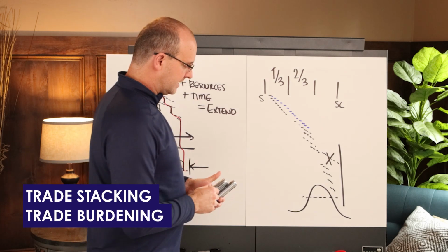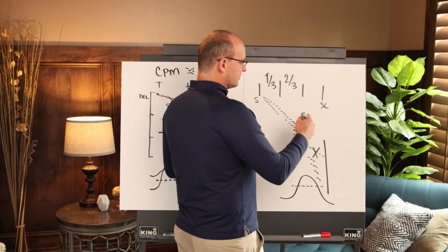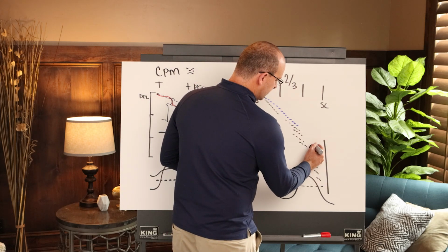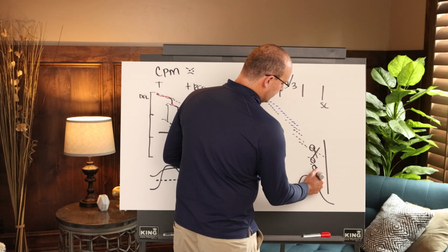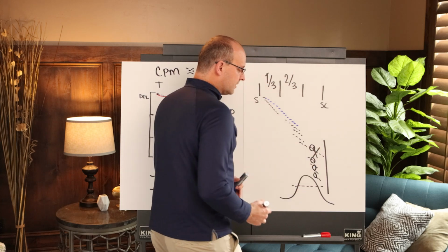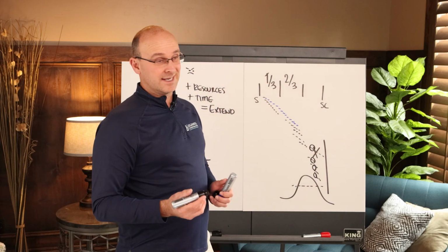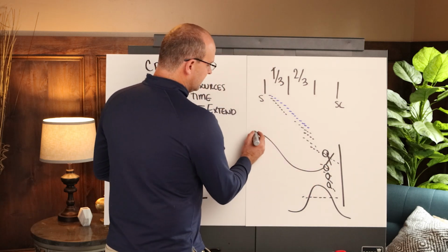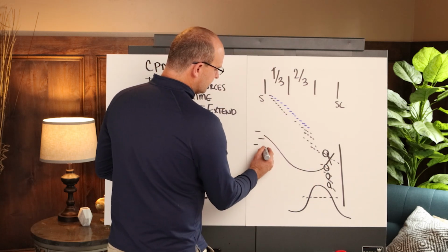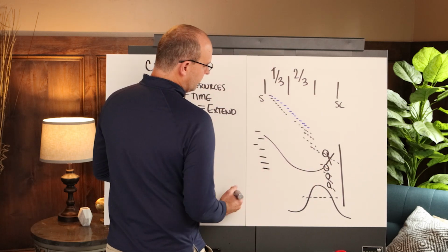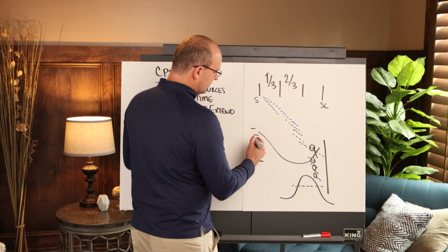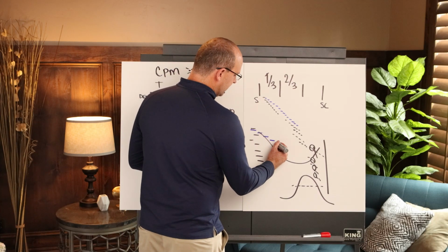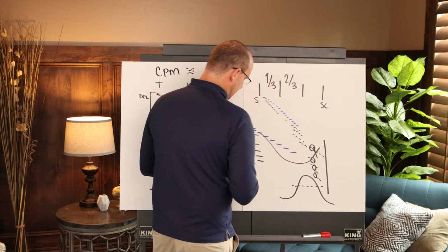What I mean by that is that whereas before you may have had a trade flowing from area to area, you might have one trade that's here, here, here, here, and typically we see it in 10 different locations. You have them in 10 different locations, which means that they're expected to do something like this with one crew, but they really can only do this with one crew, right? So your schedule is lying to you.